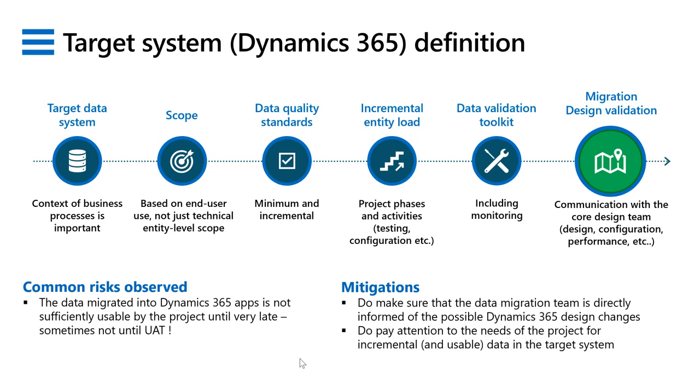It's very important in terms of usability that you think of the breadth of the record before you think of the depth. So it's better to have 20 customer records that are migrated cleanly than 2,000 that you can't use. Similarly, if you've got 20 but they are only in customer group A and you're not yet ready to migrate maybe those in customer group B or C because they're more complex customer hierarchies or some other complication, even that is preferable because you've got something meaningful, well-defined, that's usable. It's okay then in the next iteration to bring in the more complex data.